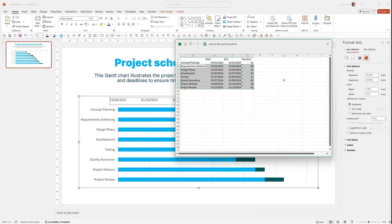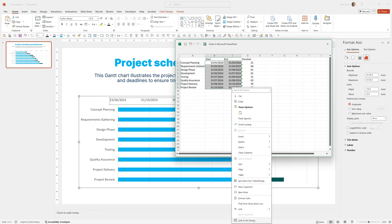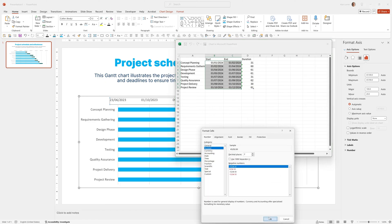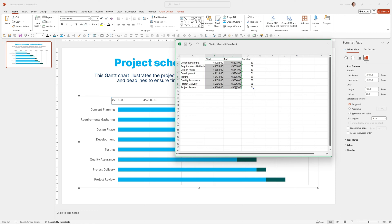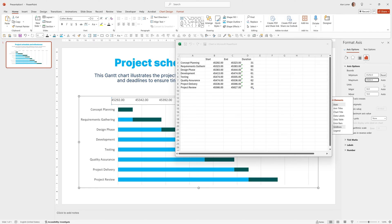To set these, the easiest way is to go to the date cells and turn them into numbers temporarily. So right-click, Format Cells, select Number and click OK. Now you can see the lowest and highest numbers. For example, this one is 45292 for the minimum — press Tab — and then 45627 for the maximum. Type those values into the axis minimum and maximum fields.